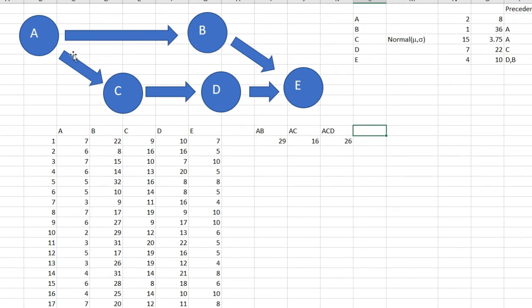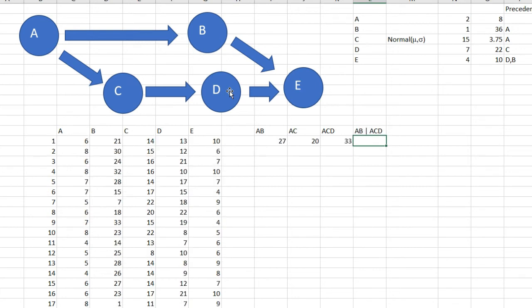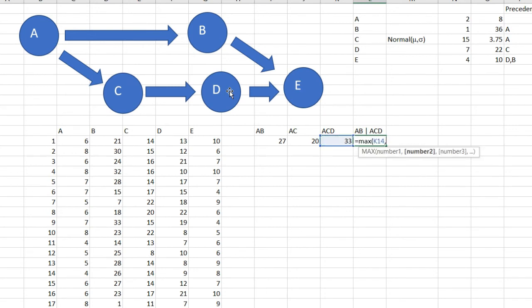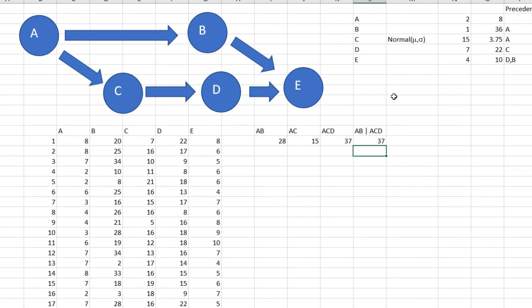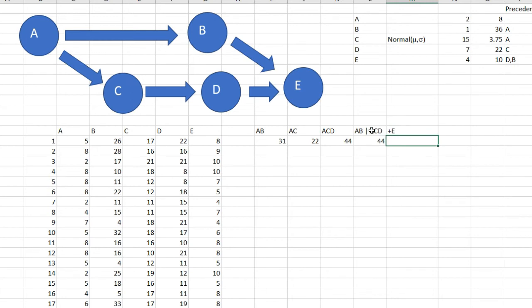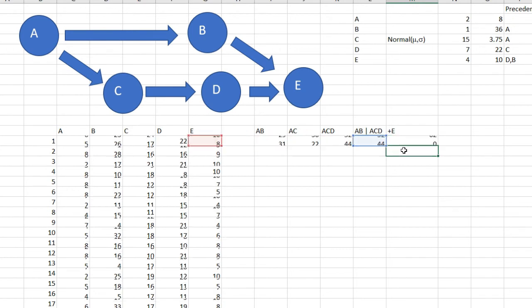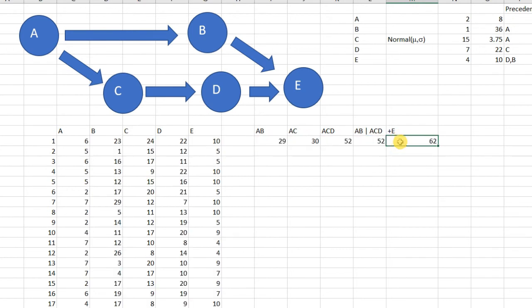Now the trick here is in E. E will depend on the longest time between AB and ACD, so I need to find the longest time. First of all I'm going to write what is the longest time: AB or ACD? And this is equal to the maximum between ACD and AB. And finally it's going to be including E, so this cell, whatever happens here plus E.